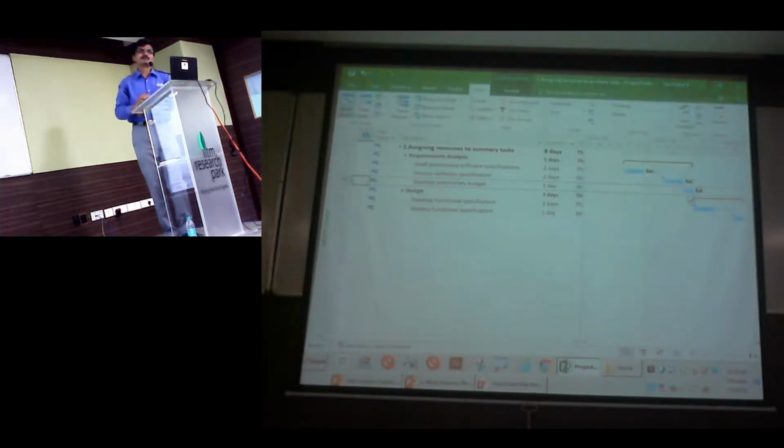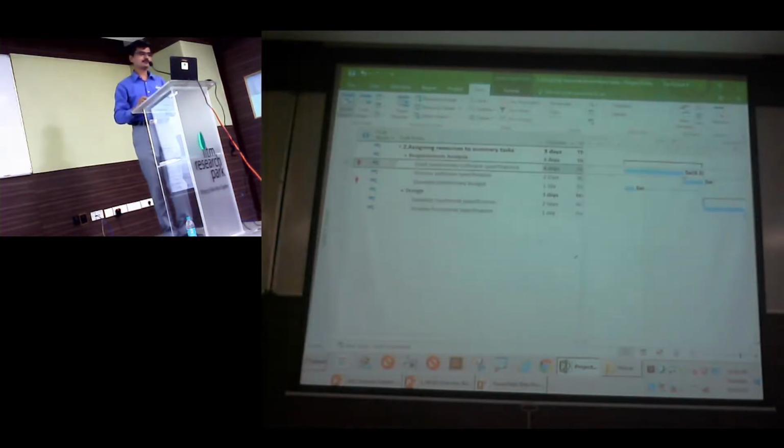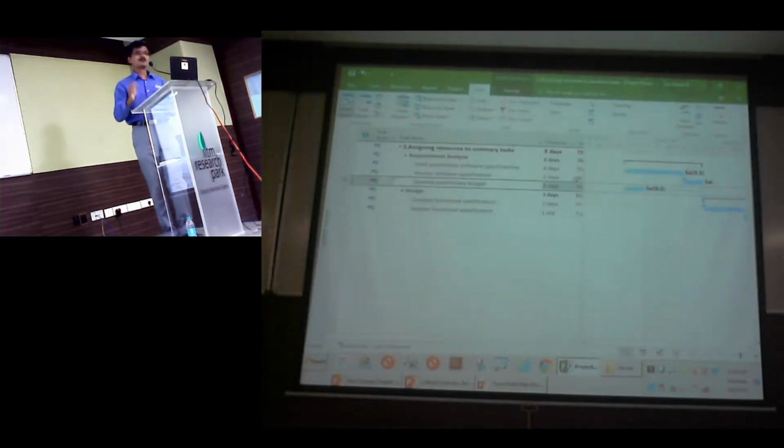That's true. See, in that he's bringing in another resource, right? Correct. Say 2 days, I'm leaving it. In the resource name, I'm bringing, say, resource 1, 50%, comma resource 2, 50%. Totally agree. So I can even demonstrate that here. I can just reduce the units. It is not 50%, I just change the settings to decimals. So I can just say 0.5 on the first, that is about 50% for you. For the third, I am just going to say it is 0.5. So in this case, there should not be any error.